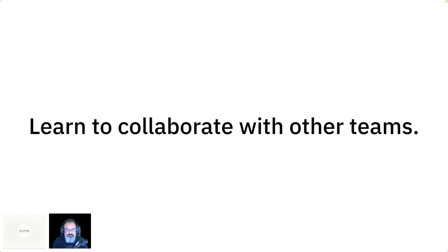Initially, this put things to a grinding halt, right? Because now all of a sudden, you've got to write all this documentation because you got a new person here who knows nothing about what you've been doing for the last N number of years. But then all of a sudden, the next one has started going faster because you rewrote that documentation. You now train that new person. And now that new person that just came in turns out they were an expert on that API that you've been having trouble with over on that other portion of the app. Wait a second, they actually know who wrote that thing and can talk to them. Before you know it, it's no longer tribal knowledge.